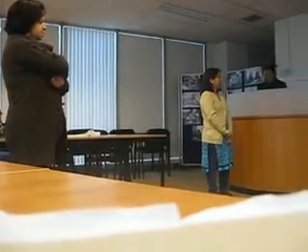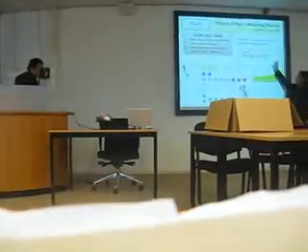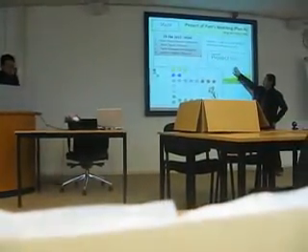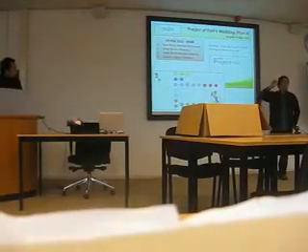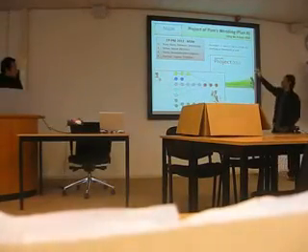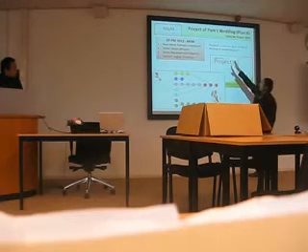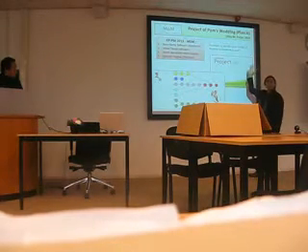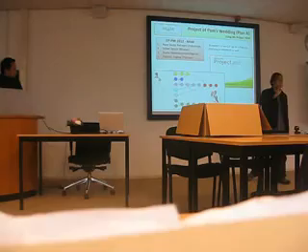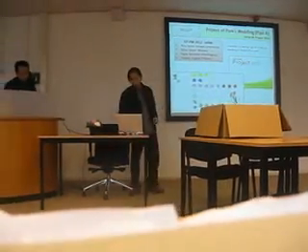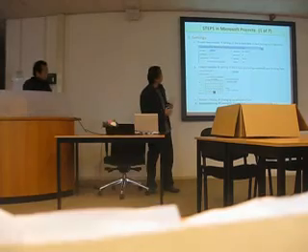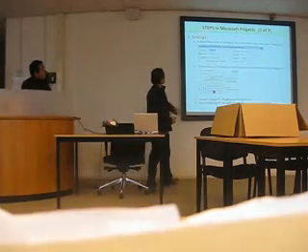So our time constraints are these ones. When we want to enter a project into Microsoft Project 2010, we have to understand the time constraint. We have to understand the duration of the project. In this case, the duration is the 1st of January up to the 1st of February, because the date of the wedding is the 1st of February. Every time you want to enter data into Microsoft Project, remember this setting.